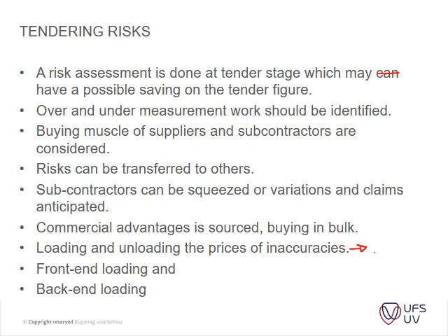Okay, front-end loading, that was what I was talking about just now, where you load your items at the front of your project, for instance your excavations, your concrete work, and so on. Obviously you do that discreetly, and you only make slight changes at the front, because the bigger your loading at the front, the higher your risk will be.